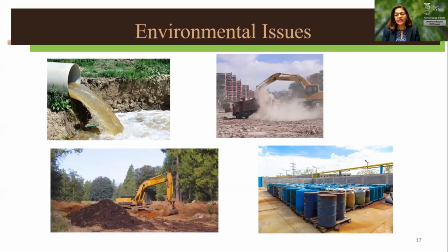Another factor that we consider would be what are the potential impacts to the air quality. A lot of the times during the construction phase, dust becomes an issue, and therefore the EMA will review and assess what are your potential mitigation measures to reduce this impact on the surrounding environment. We also consider impacts to flora and fauna, to plants and animals. So for example, if you're clearing an expansive area, then is it close to any environmentally sensitive areas, or is it the habitat for any environmentally sensitive species? So an assessment is also considered there.